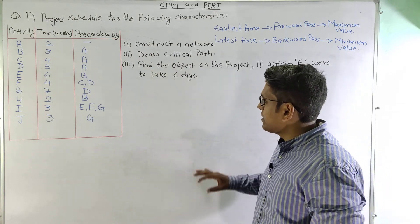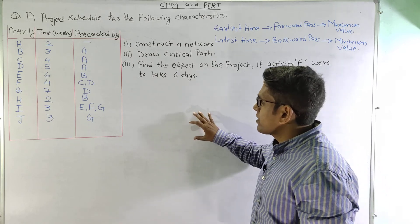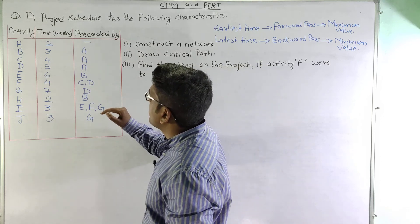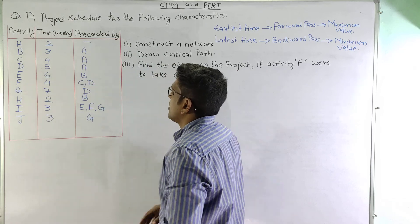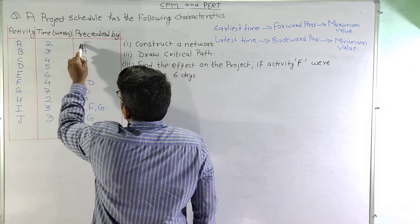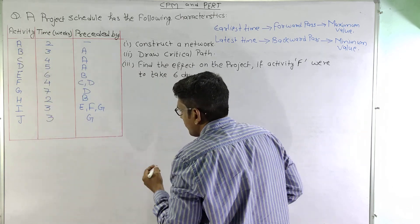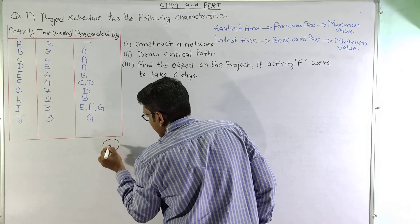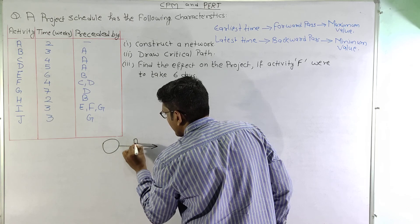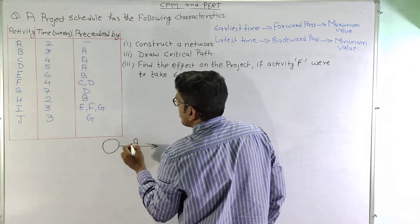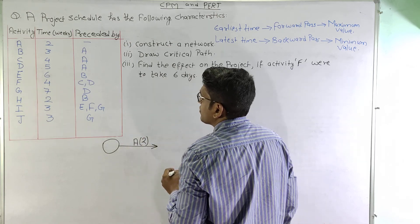Let us start by constructing the network. First, we will see which is the unprecedented activity in this problem. As we can see, the only activity with no predecessor is activity A. So we can start activity A from the starting node. Activity A has a time of 2 weeks.